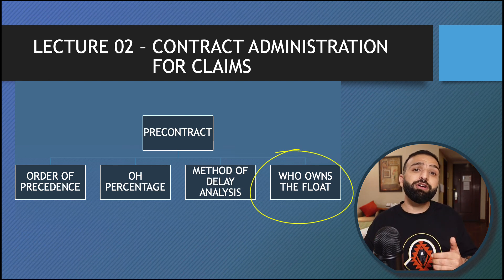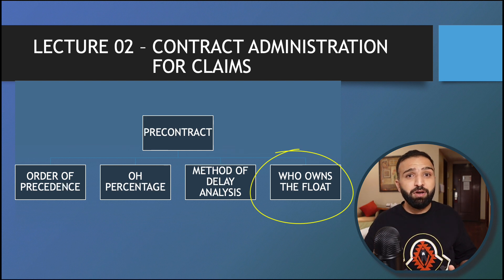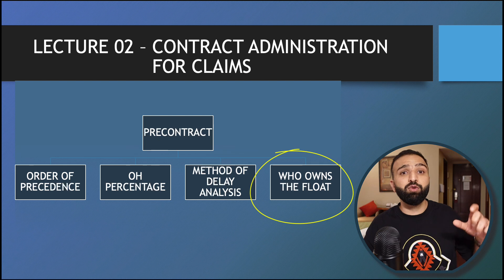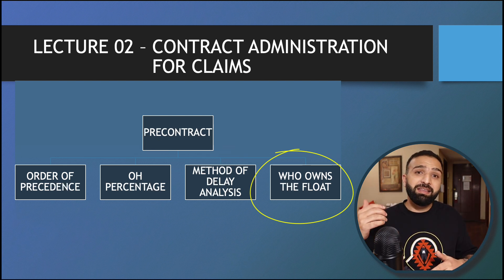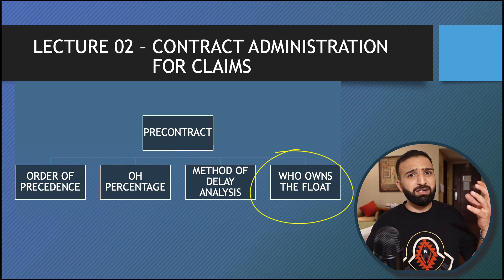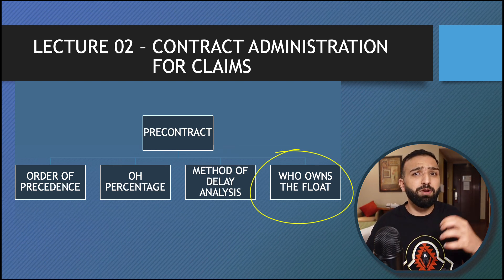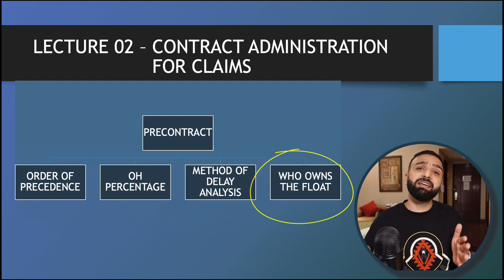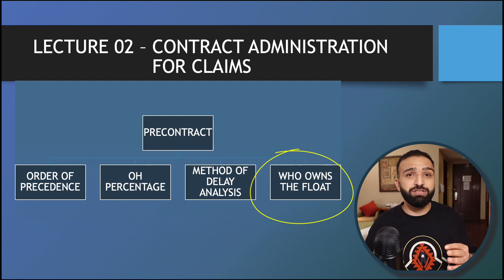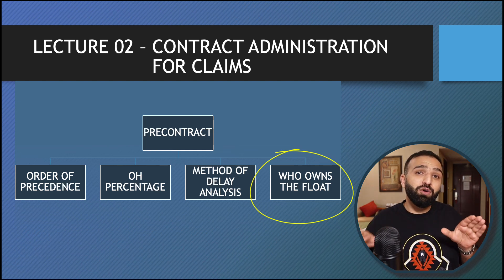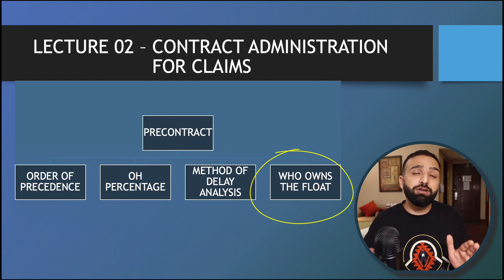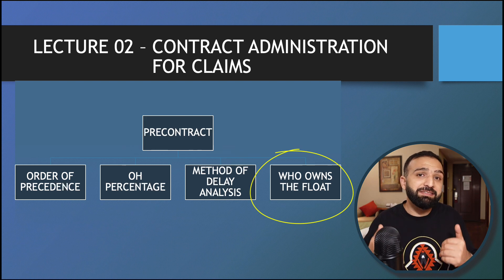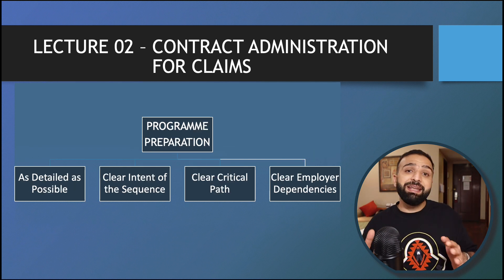The fourth important thing that needs to be implemented in the contract is to define who owns the float. This is often a point of conflict because you are denied claims because the engineer thinks you have the float, and the engineer and employer consume all of it, while you argue that the program is yours so the float belongs to you. This is an endless cycle that happens in almost every project. If it is defined how the float is meant to be used, it will resolve a lot of conflict and make our lives easier as claimants.